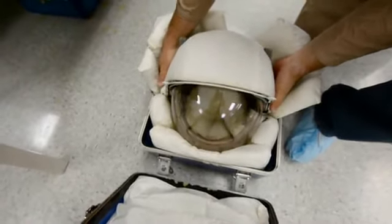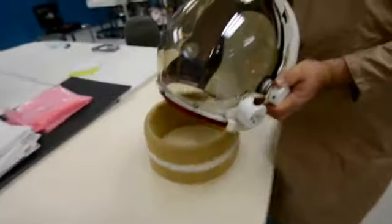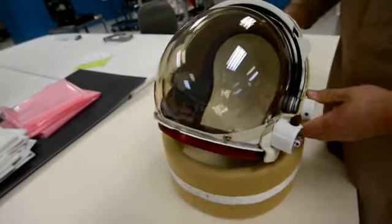This was one of 4 shuttle helmet EVAs that we had at the time. This could happen to another technician if we didn't change the process. As soon as it happened, he realized what happened and how to fix it. One of the first things he told me is, this would never have happened if I'd had a bigger donut. Within the next day or two, we had the bigger donuts and